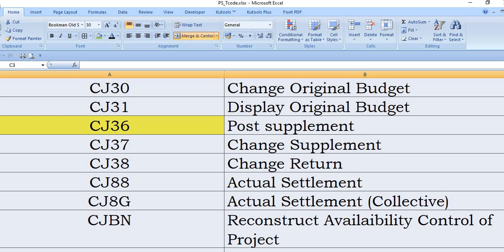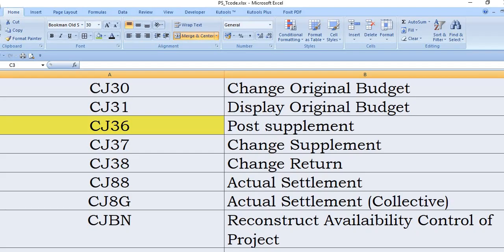CJ88 is very important. This is used for actual settlement, meaning the user needs to transfer the cost from the network element to WBS, clearing GL, from the WBS to PS clearing, and then from WBS PS clearing to CWIP, and CWIP to completed fixed assets.